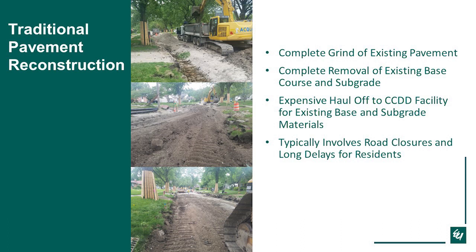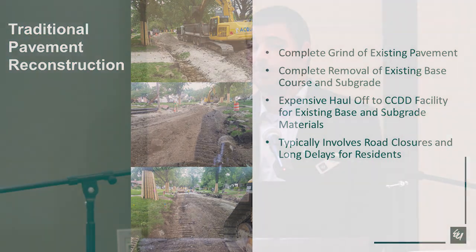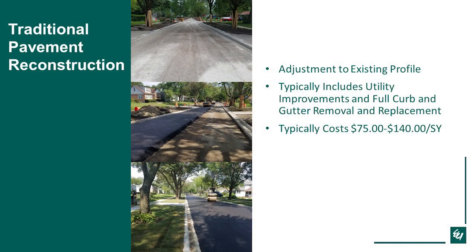It's extremely expensive because you have to haul off all the material to either a CCDD facility, or if you're unlucky and have contaminated soil, to a non-special waste facility. And then it typically involves road closures, possibly detours, and typically doesn't make people very happy. But sometimes that's what's needed and recommended in order to get the lifespan you want out of the roadway. Sometimes you make some adjustments to the existing profile to get the road to drain properly.